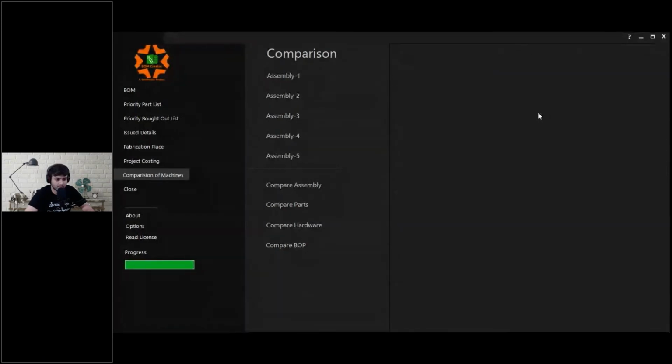As a practice, we plan each project individually. We have an individual project manager for each project, and the drawings are released individually for each project. And at the end, we get a lot of material scrap, unknowingly. So what we are giving is a provision to compare your projects, maximum 5 projects at a time, and identify what are my common and unique components. How does this help? If I plan my common components together, I tend to get lesser scrap.